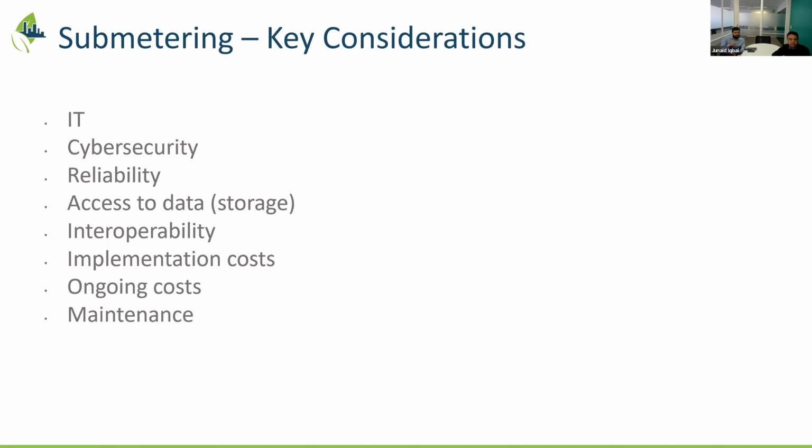If I can add quickly to what Junaid mentioned and the great points mentioned by Amanda, from my previous experience in the pharma sector, where we were installing sub-meters, one of the mistakes typically made from an engineering project management perspective is that key stakeholders like IT were involved in the implementation phase, and by that time it was already too late.